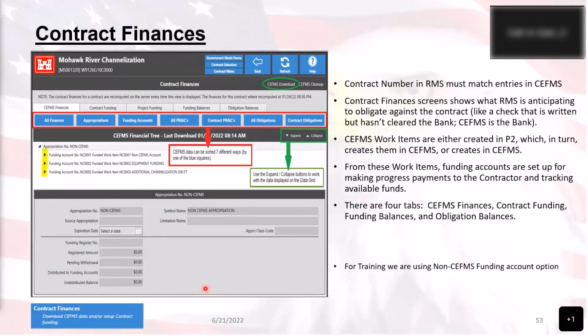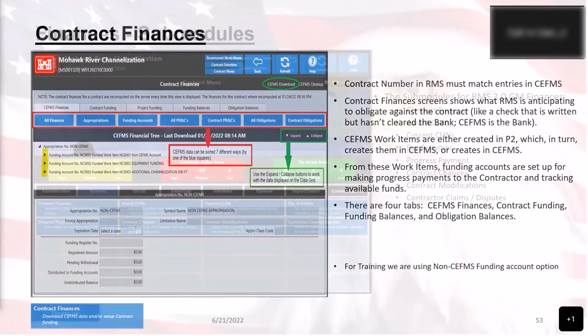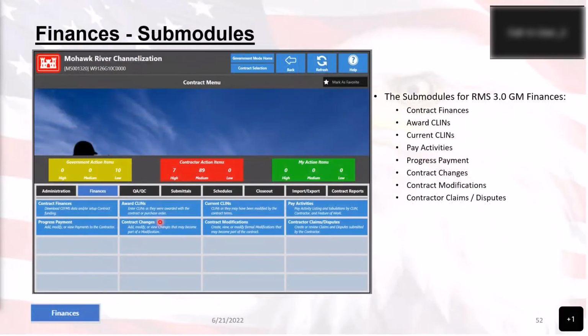Because prior to the contract award actual date and the duration being set, when you go to the Finances tab, the only thing that you're going to see in this section right here is a little button that says Future Contracted. It could be useful if you're going to be adding information for the future, but if this isn't supposed to be an active contract that you're going to work on, you need to update those schedules in order to get that in.